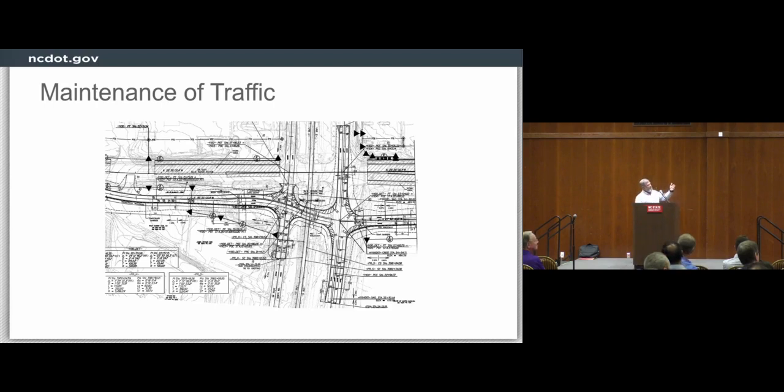One is, remember we talked about the bridge construction. The bridge construction would have been up in the top right-hand corner. You can see, or maybe you can't, but you can tell the limits of what I've got shown here would have been how far we would have had to go back just to make the tie. And the reason being is the railroad track sat about 5 foot above Hillsborough Road. And so in order to come up and over and then back down, that caused a lot of wedging of asphalt that would have had to gone out either direction of Hillsborough, which would have caused a lot of heartburn in how to get this in, how to maintain traffic. Now you've got this wedging going across that kind of slows down the bridge construction of Hillsborough.